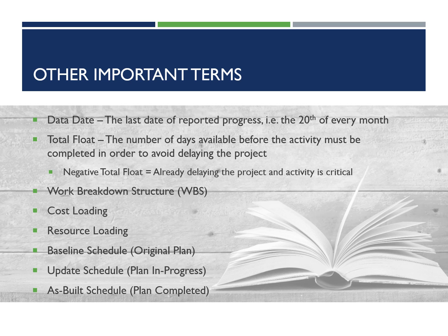This is helpful when you're doing an analysis of a schedule, so you can compare the previous month's progress to this month's progress and what we can expect for the next month. In this example, we use the 20th of every month. I typically like to use the 1st of every month because every month has a first. Not every month has a 31st.